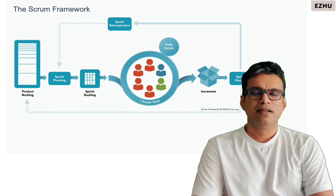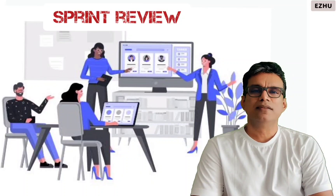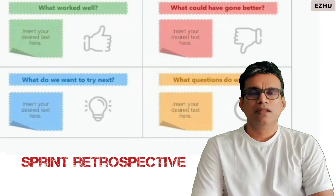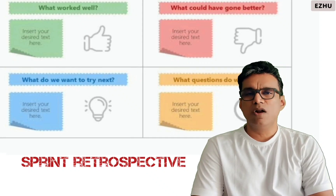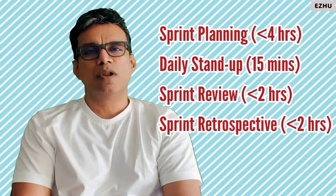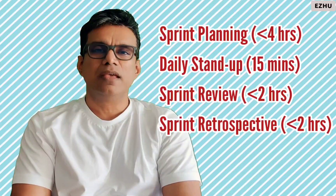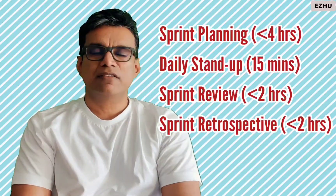The sprint review is a product demo given to the product owner. Following the demo, there is a sprint retrospective where the team discusses what went well, what did not go well, areas of risk, and points to escalate. Sprint planning is typically done for a maximum of four hours, daily stand-up calls for 15 minutes, the sprint review for a maximum of two hours, and the sprint retrospective for a maximum of two hours as well.